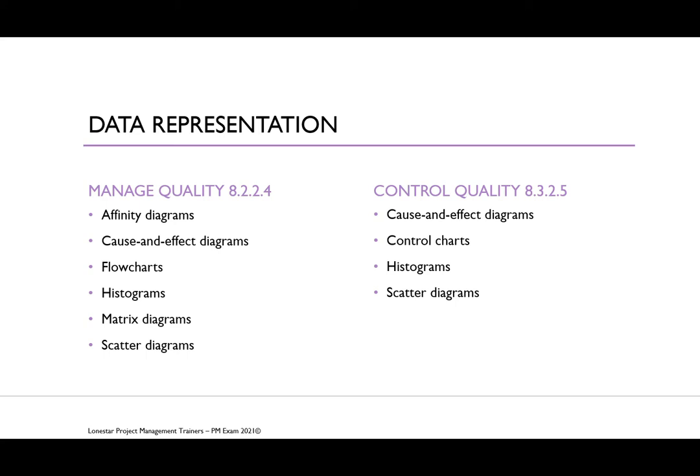Your cause and effect diagram is also known as the fishbone diagram and the Why-Why diagram, in addition to the Ishikawa diagram. Now, those types of diagrams break down the causes of the problem statement identified into discrete branches, which is going to help identify the main or root cause of the problem.